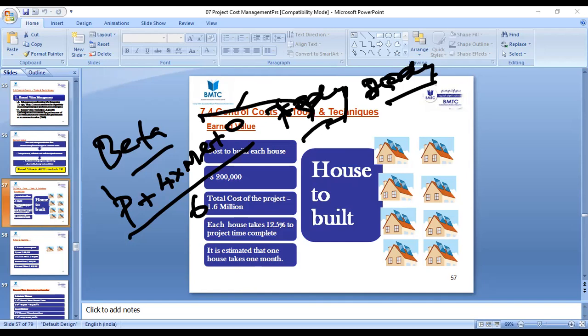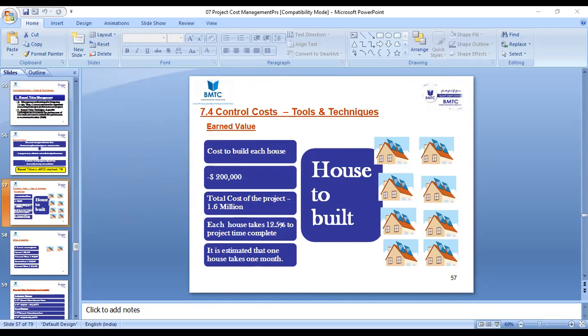So what is the other name given for the triangular distribution and beta distribution, or the 3-point estimation? What is the other name? Most planning engineers, especially when scheduling their tasks and finding the duration for each and every task completion, call this PERT calculations. What is PERT? Many planning managers call the P Program, the schedule as a program. So Program Evaluation Review Technique. The calculation is called PERT calculation. Most people use PERT calculation in the CPM to develop the schedule, right?